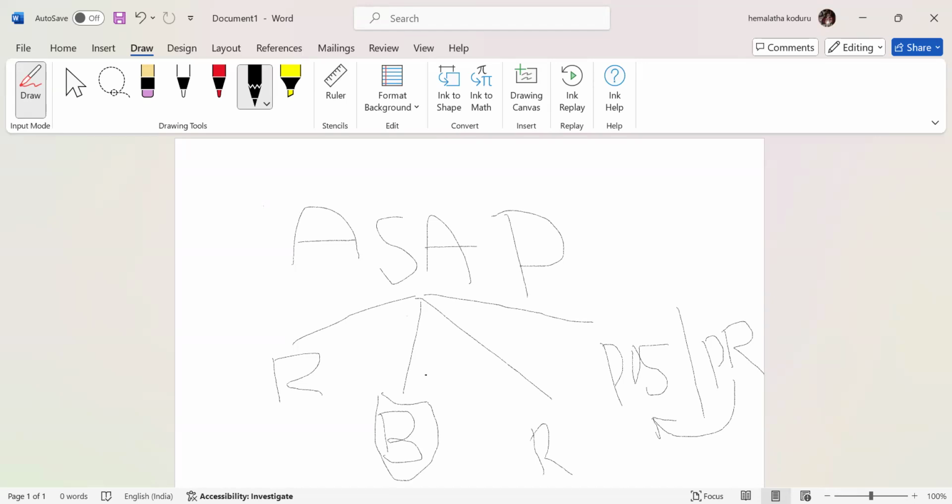Once the custom changes have been done, for those particular custom changes we should prepare our notes, which is called a functional specification. If it is the technical side that is changing, there will be a technical specification. If we are changing from the functional side, we have a functional specification. In the same way, not only technical changes, any configurational changes will also be called a functional spec, where you have to prepare what the change is, before and after.